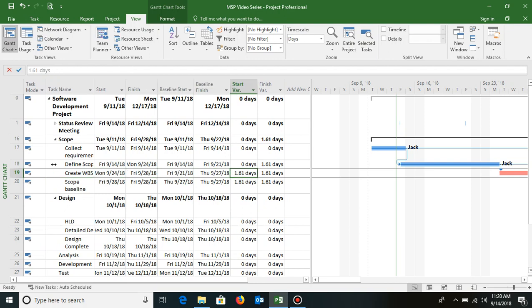So this way you can do it. Like I inserted actual finish, you can also insert actual start or actual duration and update the task. Now next, what I need to show you is how to mark tasks in terms of percentage complete. When is percentage complete generally used? Percentage complete is generally used when your work is deliverable oriented. Let's say I have to develop 10 modules of the application, and I have done 6, so 60% done. When I can count, percentage complete is an easier way of doing it.